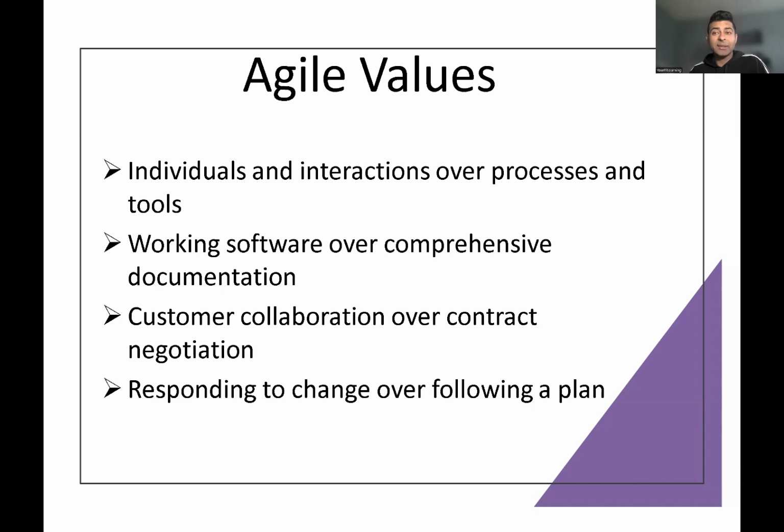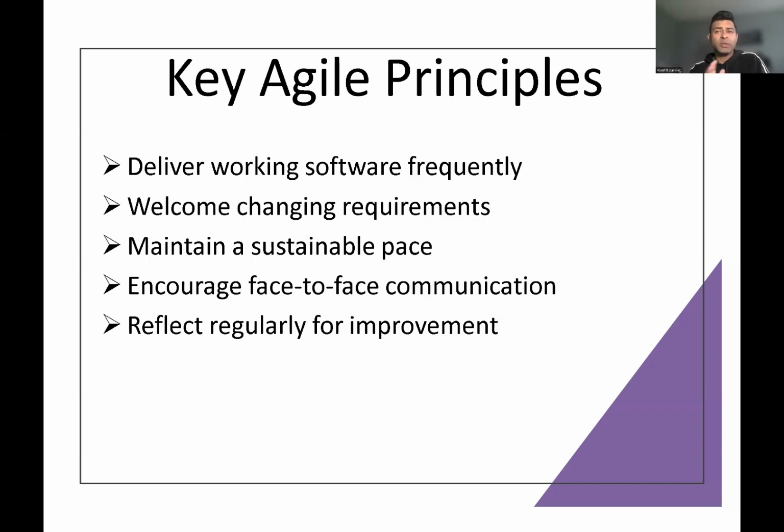The user stories which come to sprint planning are the ones which are prioritized, the ones which need to be done. Once they come to the sprint planning, then it goes to the sprint. Once the sprint starts, it is developed by the developer, tested by the QA, and tested by you as a BA on a high level, because you have to provide the demo to the stakeholder. Once it is reviewed by the stakeholder, we call it a demo session. They say, yeah, thumbs up, it's all good, then the user story is marked as done. And don't worry, I will talk about Scrum ceremonies in the next few slides as well.